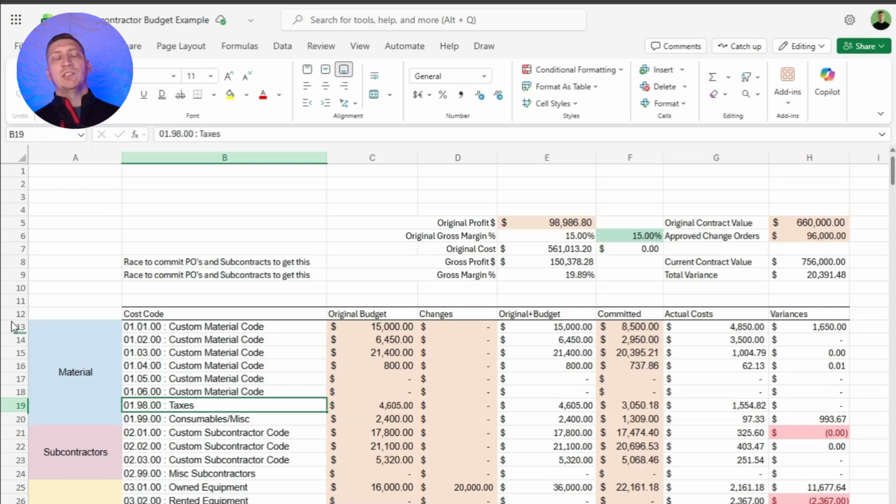And then we also want it trackable in real life. We want the field people to know, hey, we're going to track how much labor it takes to put in this manhole, or from mile marker 1 to 5, because we need to know so we can do these things. Or we're tracking unit A in a multifamily, or we're tracking floors, or whatever that is. You solve a lot of problems, like something is too vague or too granular, when you think about it.